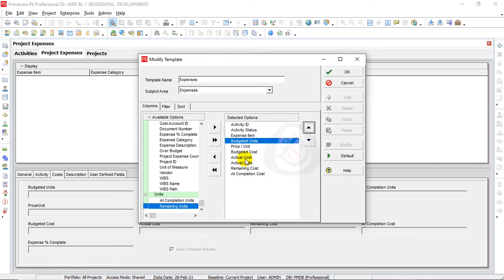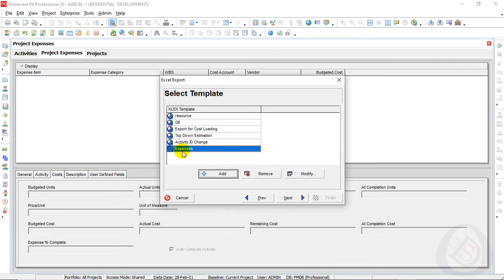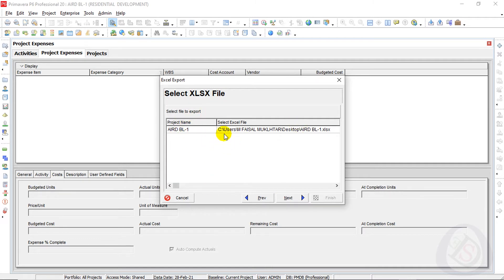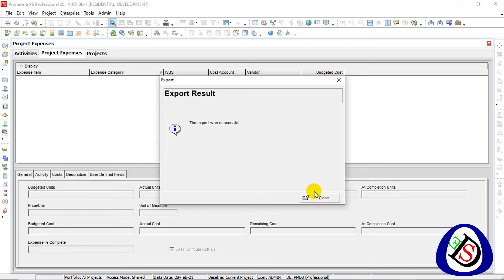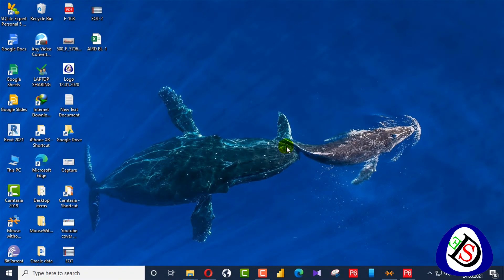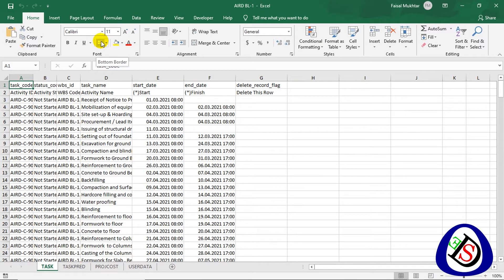Similarly, Actual Units multiplied by Price Per Unit gives Actual Cost. At Completion Cost represents the total cost required to complete that activity or expense. I press OK, the Activity Expenses template is added. I select the template, click Next, save to my desktop, press Next, and Finish. The export is complete — I close and minimize the window.